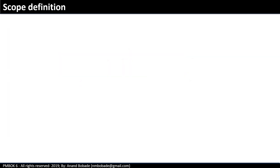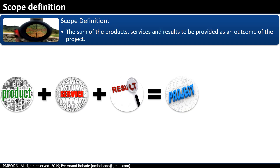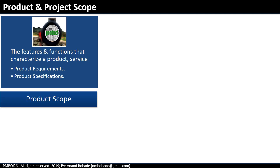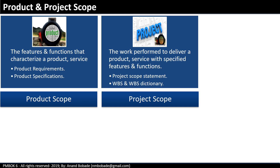Let's go through the scope definition. Scope is the sum of the products, services and results to be provided as an outcome of the project. Some projects may have all three elements or only one or two. For example, a call center upgrade project may deliver a product — improved call center software — and a service — improved call center service. Product scope includes the features and functions that characterize a product or service, generally referred to as product requirement or specification documents. Project scope is the work performed to deliver that product or service with specified features and functions, referred to as the project scope statement, WBS and WBS dictionary.